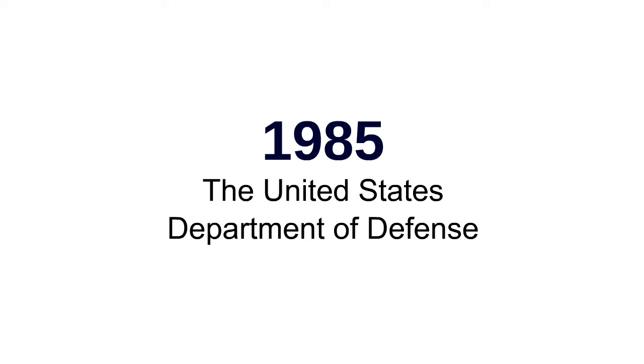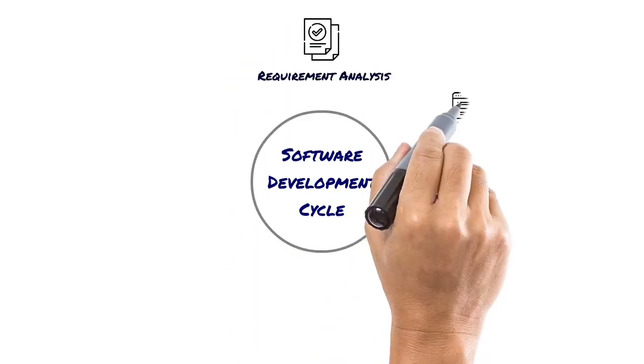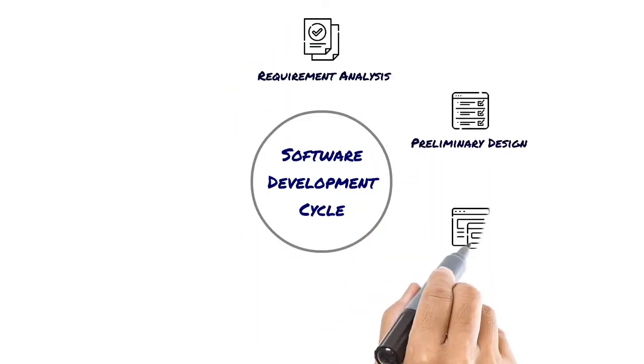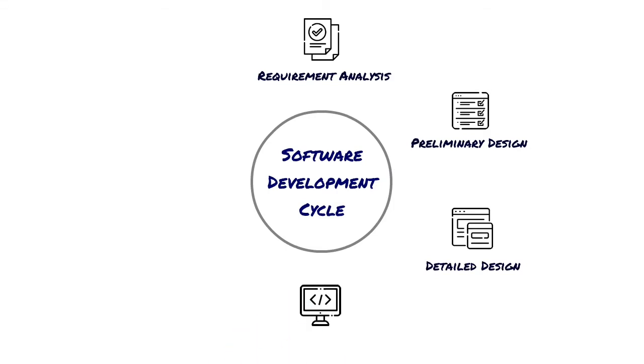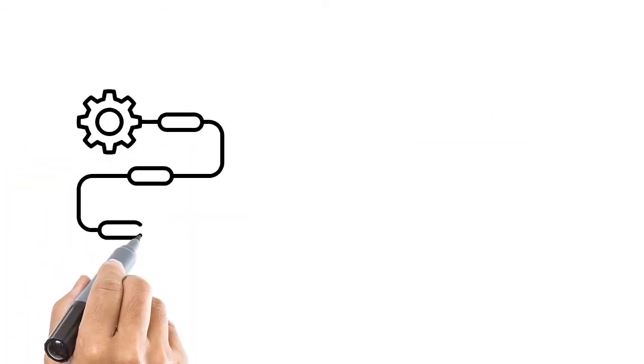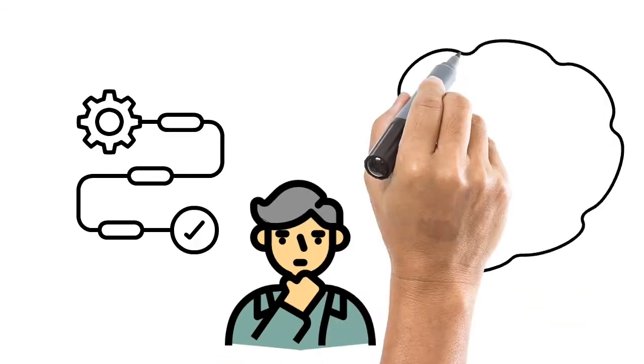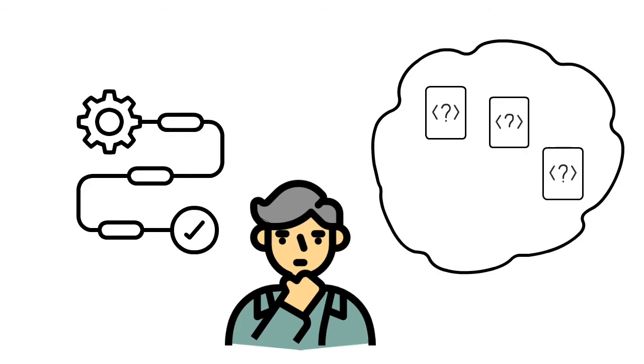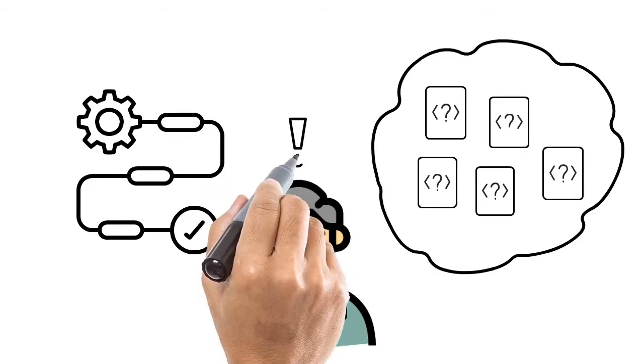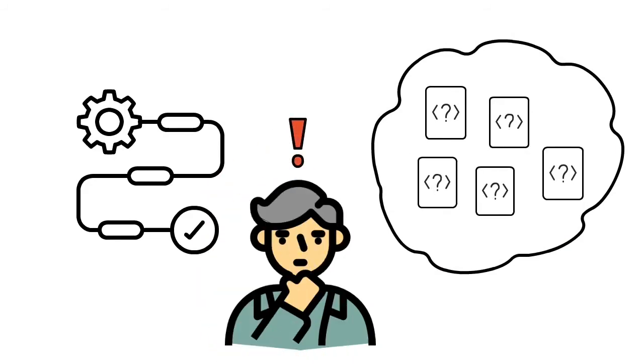which stated that the contractor should implement a software development cycle that includes the following 6 phases: software requirement analysis, preliminary design, detailed design, coding and unit testing, integration, and testing. Following stringent processes made the development process rigid, and there wasn't much scope to adopt changes during the project's execution. Additionally, a well-defined process is not the answer to every problem, but being adaptive to change is.